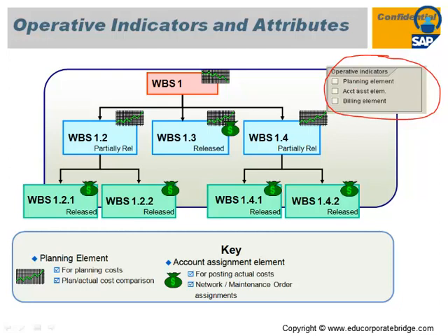Billing element, where you want to link your WBS to the SD module, that is, a sales order. If there are certain products that you have to sell later on, in the case of a customer project, or in the case of a revenue project where you want to sell that particular project, then you have to create one WBS which is the billing element. So it is integrated with the PS and SD modules.